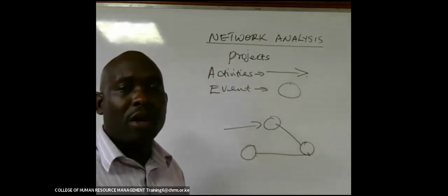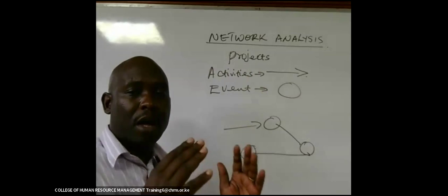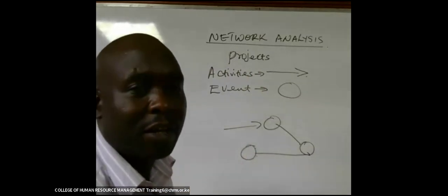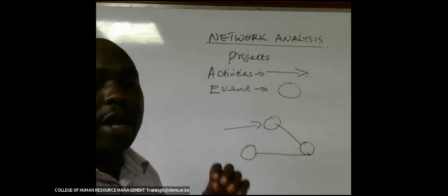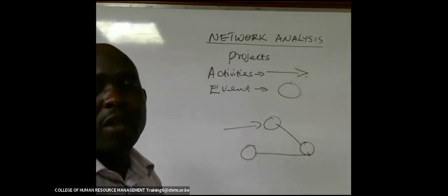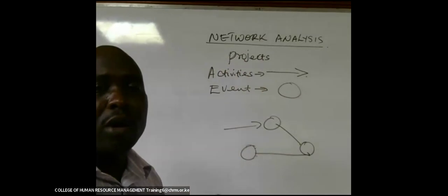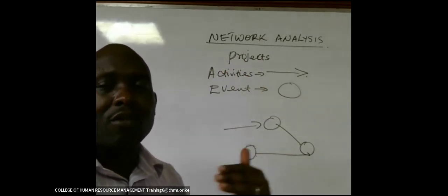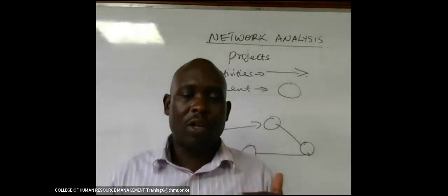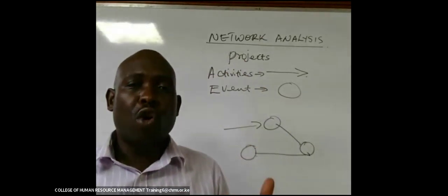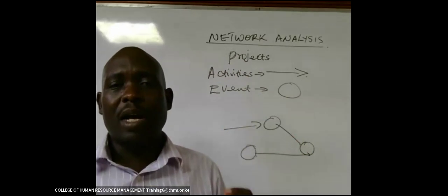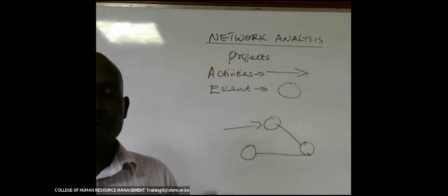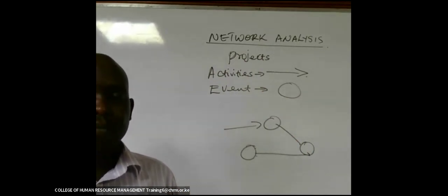In case the activities are not interlinked or there is a hanging activity, what we call the danglers, we should also avoid them. At one point, we are going to incorporate the dummy activities, which we said is an activity that does not consume time or resources, so that the logical sequence of the network can be upheld. All this will be in the network diagram.